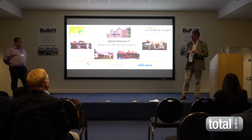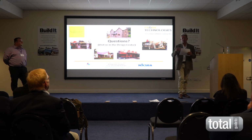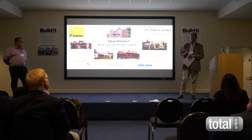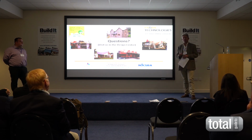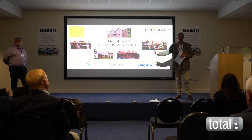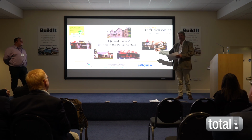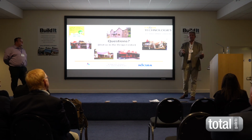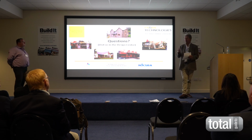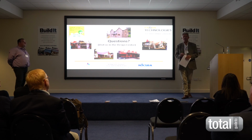The client was absolutely raving about the timber frame, because the groundworker just hadn't thought about how they were doing it, hadn't gone that bit further thinking the thing through. But again, what would they do differently? They'd have put more into the package of the timber frame. But again, if we know at the design, at the conception stage, that access is poor, we make the panels smaller. If we know that access is poor, we can design to make the steels and beams shorter. It's like anything else. We can build anything, anytime, any place, anywhere with it.